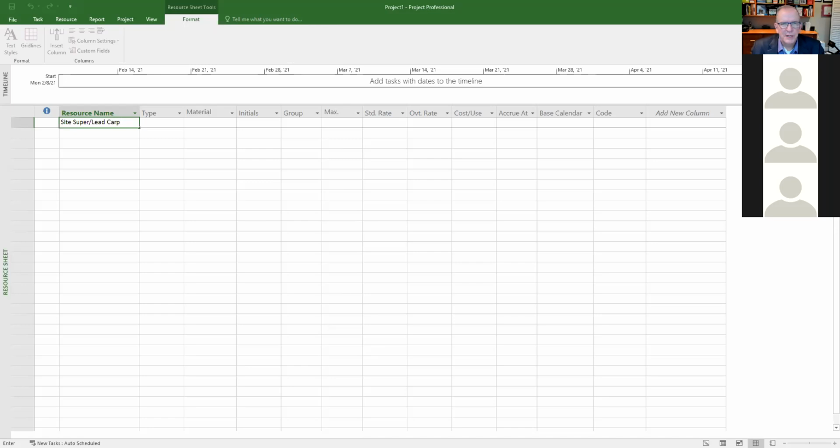In small jobs like renovation, you don't have a site super just watching the bathroom. You might have a working carpenter who is also supervising the work. It gets pretty expensive on something small like this. Normally, on projects like the office remodel, you're going to have a site super and a PM, maybe for a certain amount of time. So there, I've got that.